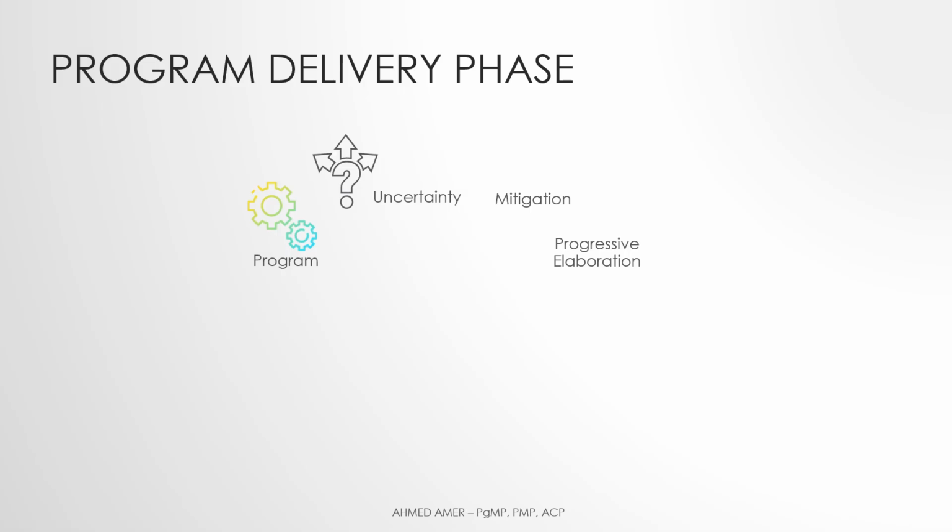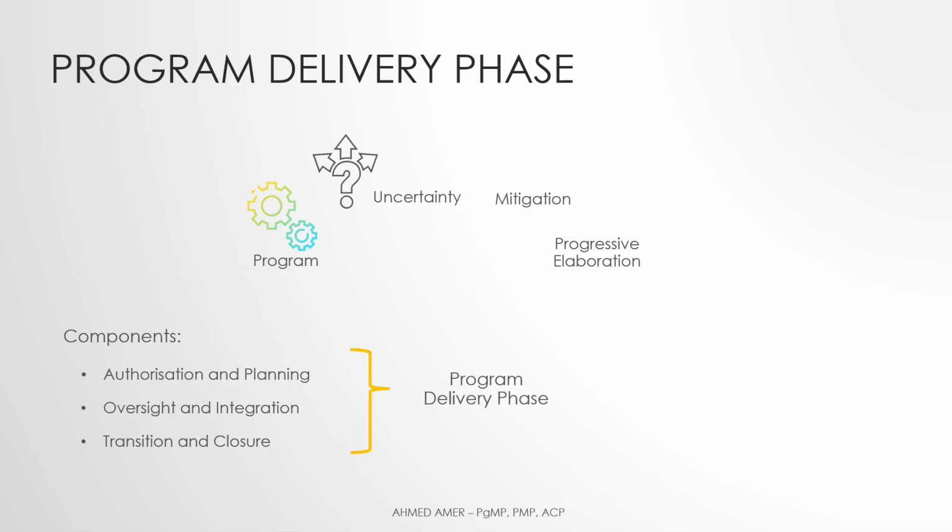During the program delivery phase, each program component will go through the following program delivery subphases: component authorization and planning, component oversight and integration, and component transition and closure.